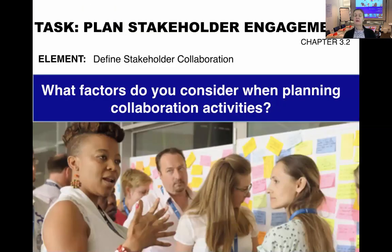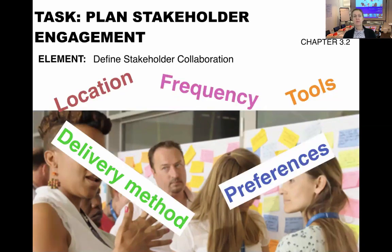Looking at the element around defining stakeholder collaboration — it's all about what factors you consider when planning collaboration activities. When you define stakeholder collaboration, you need to think about things like frequency: how often will you collaborate with stakeholders? What tools will you use? What preferences might your stakeholders have in terms of how you collaborate with them? How do you deliver information — will it be workshop format, emails, or a combination? And what locations do you need to consider — will you be physically meeting in one place or will it all be virtual meetings?